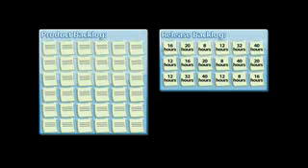To plan a release, the team starts with the product backlog, and they identify the features they want to put into this release. These features then become part of the release backlog. The team then prioritizes the features and estimates the amount of work involved for each feature, providing a rough idea of the total amount of work involved to complete the entire release.